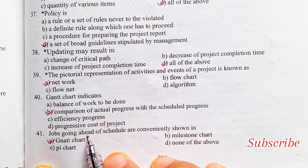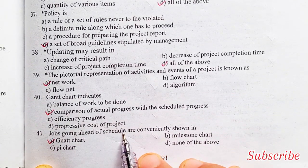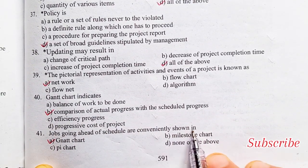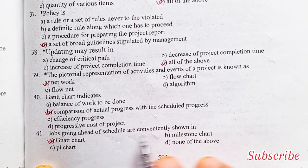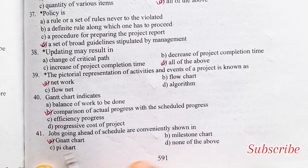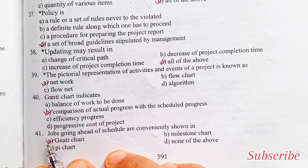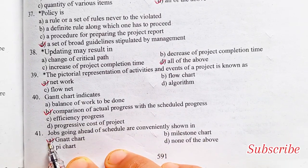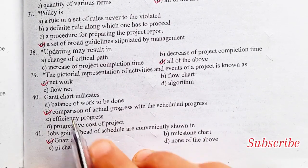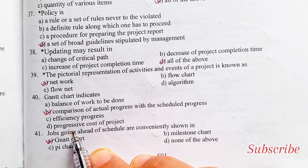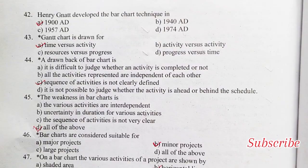Jobs going ahead of a schedule are conveniently shown in: Gantt chart, milestone chart, P chart. Option A is the right answer — Gantt chart.